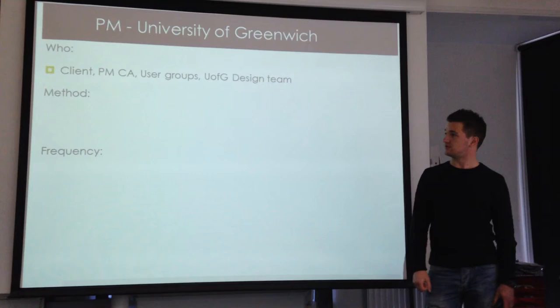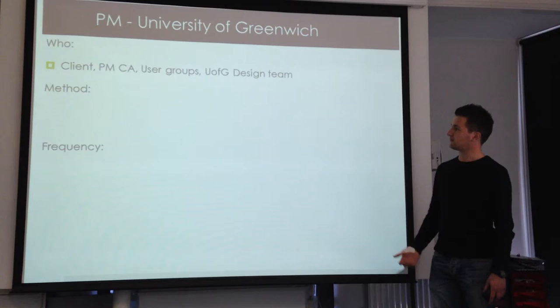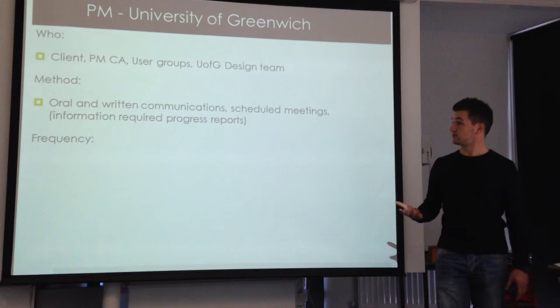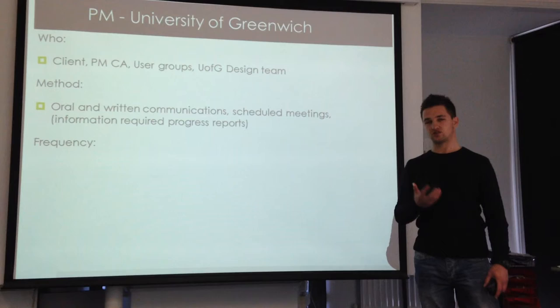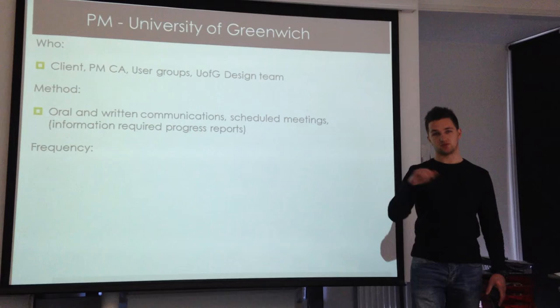So the project manager — who are they talking to? They will talk to the client, the other project manager on the contract administrator side, the user groups, the stakeholders, the end users, and the University of Greenwich design team — so the architect, the quantity surveyor, all those people. The methods they'll use: oral and written communication. There will definitely be scheduled meetings, and this is a two-way thing. They will be talking to those people, but in return they will be asking for progress reports to be sent to them. Communication is obviously a two-way thing.